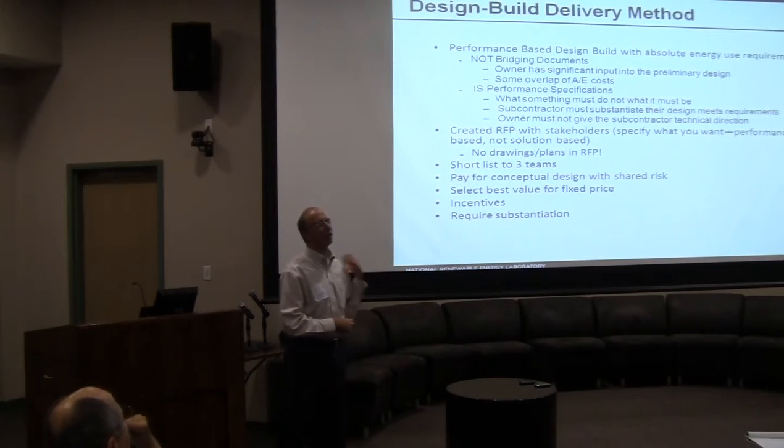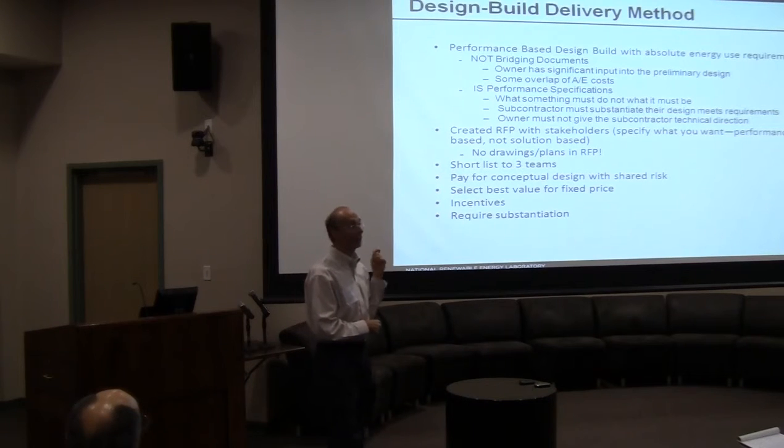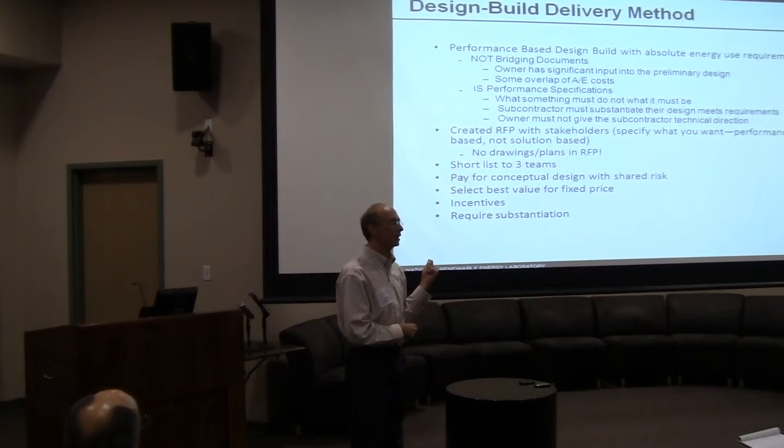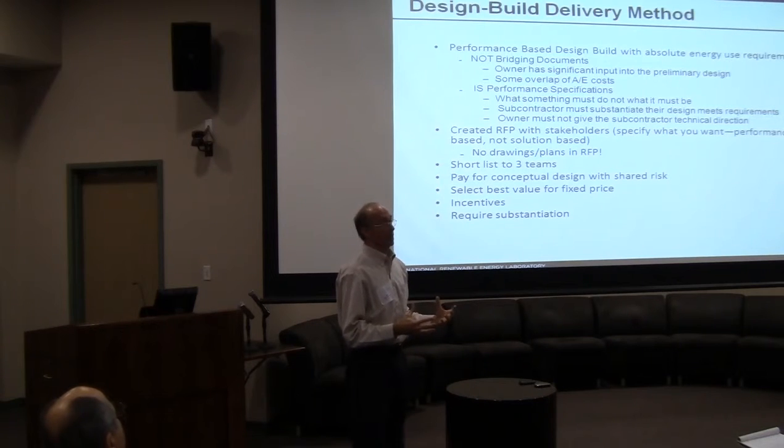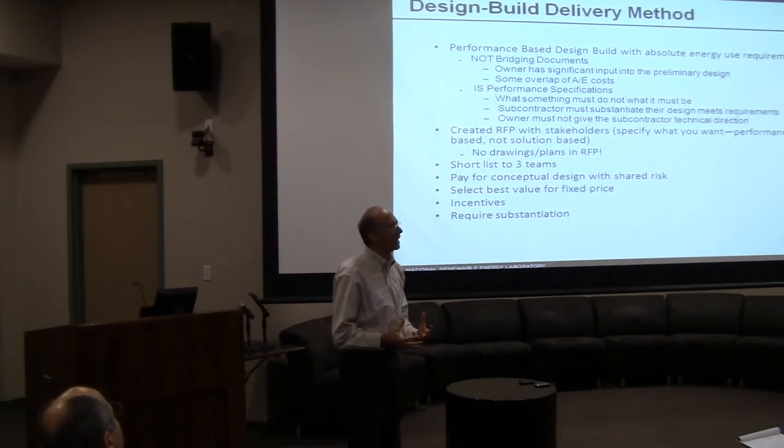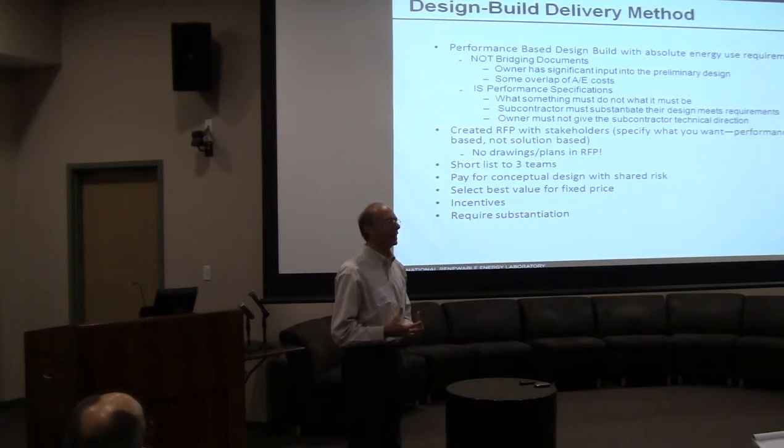And so what you're going to see here, I mean, there are things in this project. There's 42 miles of radiant tubing in this project. Right? And they, as a team, said, we really need to do this because it's a big energy saver. How are we going to do that at the same cost as ductwork? Right? So they went back to the vendor. They went to the subcontractor, the mechanical sub, and they innovated around that, and they came up with actually a rollout mat system for the tubing, which very interestingly that manufacturer is now selling as a product. They pre-assembled it all off-site, they pressurized it off-site. They came up with that innovation.